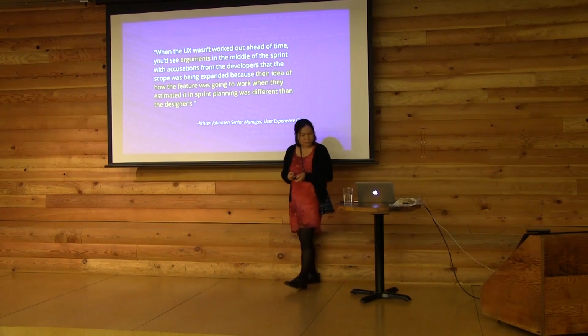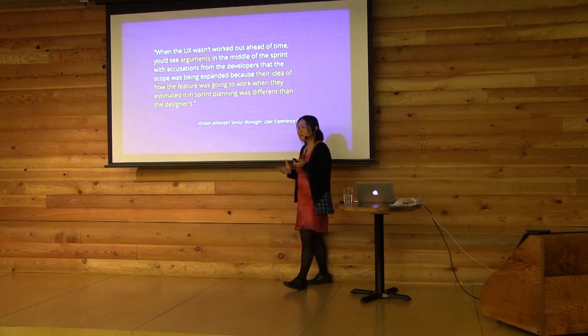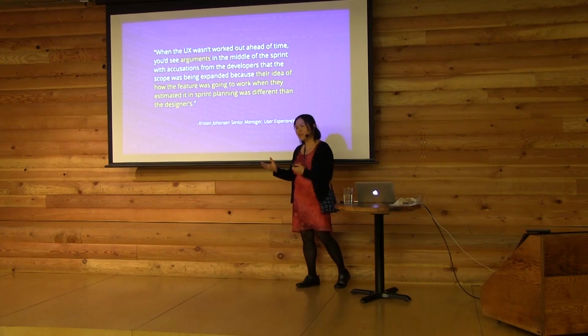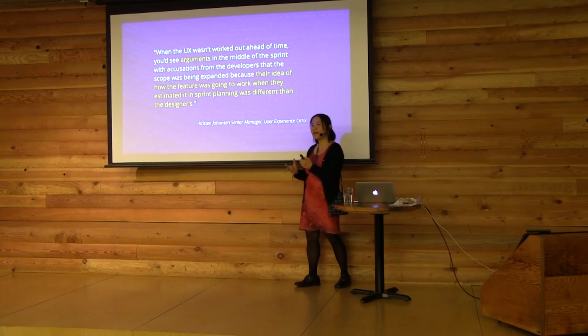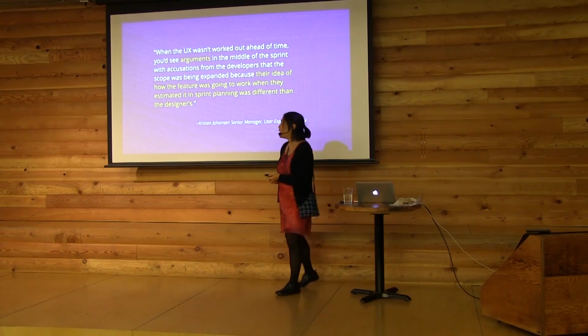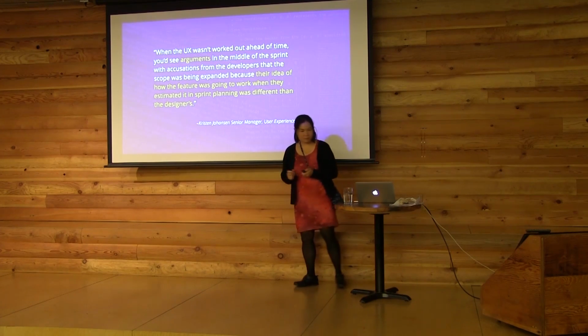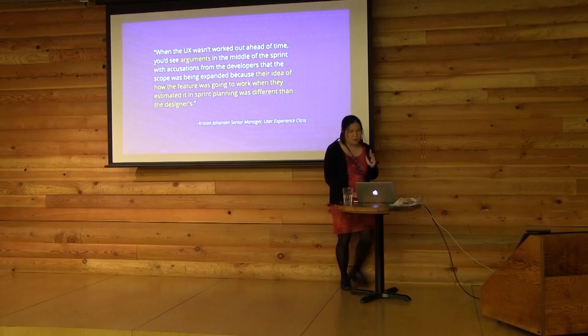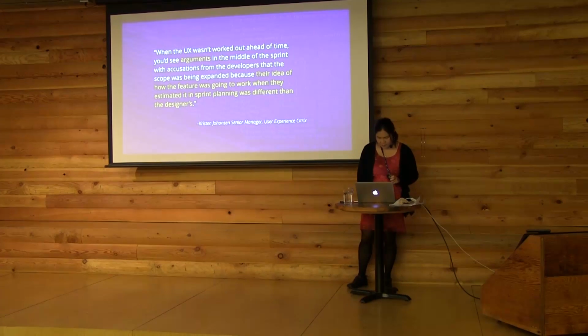So what this calls for is a process or a schedule in which you're designing, and then there's a time to consider and estimate based on the design, and based on the value of that design, before you commit to a schedule. So those are the two big issues that I see with the textbook approach to Agile.